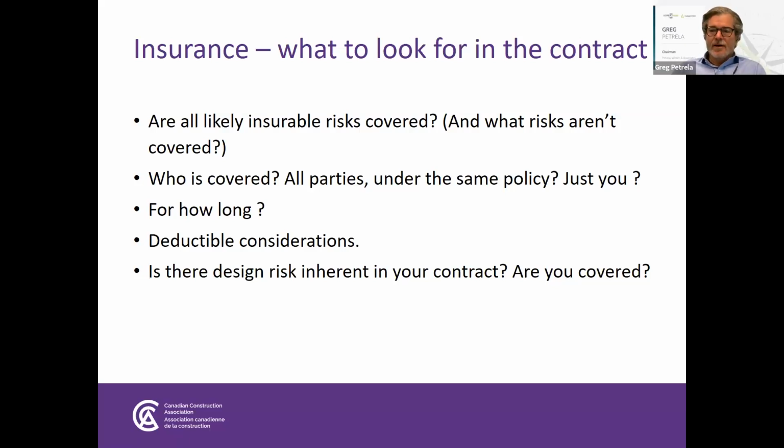Generally speaking, a commercial general liability policy or even a wrap-up liability policy, and the collection of the various policies that might exist on a project, will not cover financial damages or financial losses which are not a result of an underlying property damage incident or an underlying bodily injury circumstance.